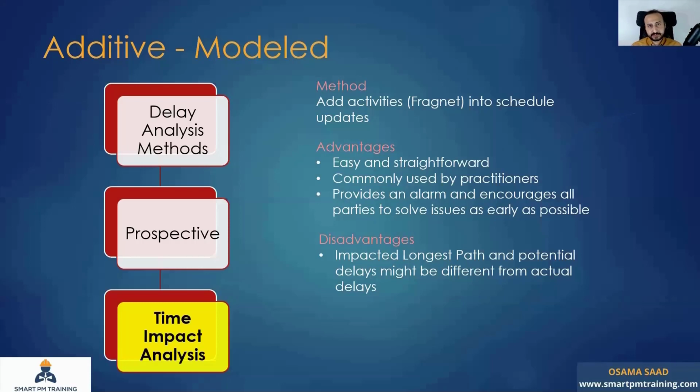So all of these variables, any change in any activity in the fragment, which will happen, by the way, it will not be perfect. It will affect the outcome. And also after the fragment, you are forecasting the remaining work as per the project, so the same length, the same duration. But anytime we are updating the program of work, it is often different from the planned work. I did not do the work within the same planned duration or the planned dates. So everything later on after the fragment will eventually be changed.